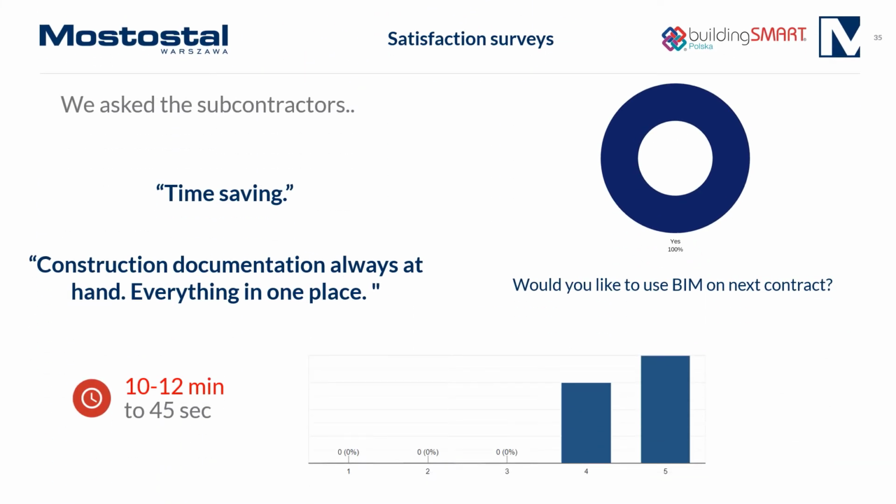After the construction process, we gave satisfaction surveys to our team, subcontractors and designers. Subcontractors appreciated the solutions that had been implemented, pointing out the transparency of communication and time savings. It turned out that we had shortened the time needed for checking documents from 10 to 20 minutes down to 45 seconds.